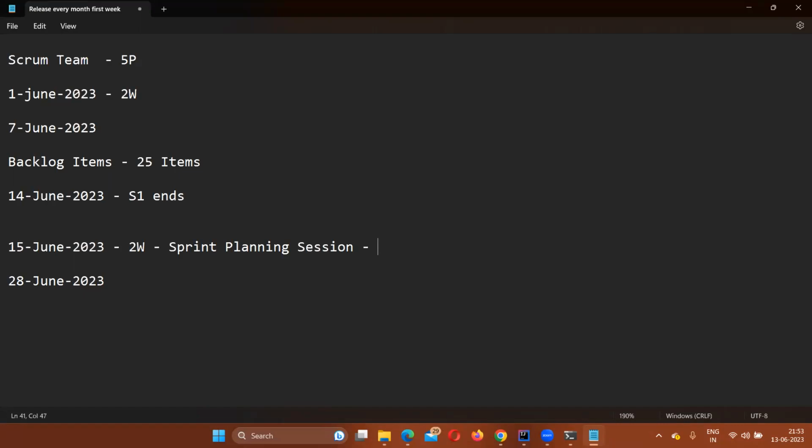So 5 backlog items, 80 hours. It's not even mandatory that you have 5 tasks and 80 hours in a sprint. So 80 by 5 is 16. Does that mean each task I will have to work on for 16 hours mandatorily? No, that's not like that. Whatever way you want to do it, you have to complete those 5 tasks in 80 hours. That is your one sprint.